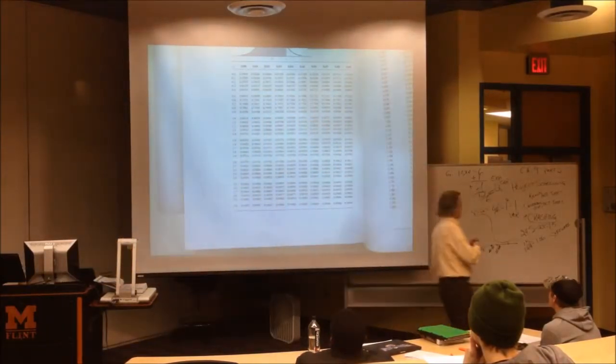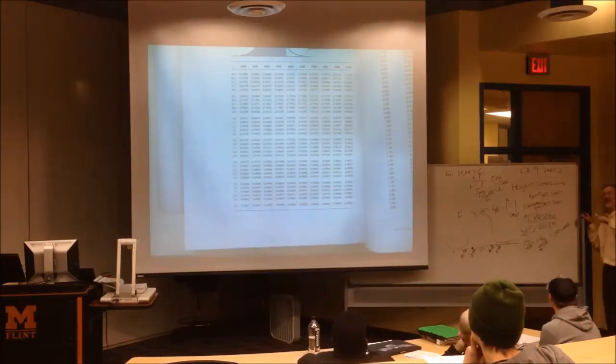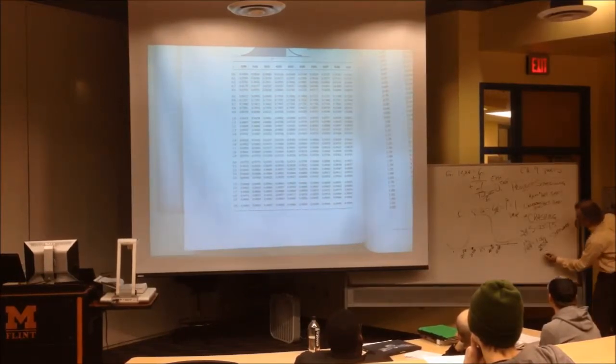0.8554. I just remembered I was saying it better. I forgot it. I didn't ask for 24.5 units of time or less. I said 24.5 units of time or more. She said 25. I said maybe 20. We'll subtract that from 100%. We get 14.6. 6.6? No, 4.6, thank you. 4.6% chance. So it was even less than both of us thought, closer to 15%.